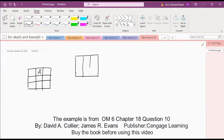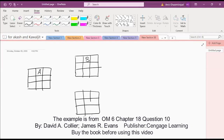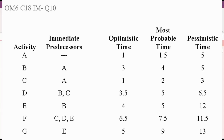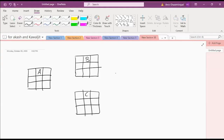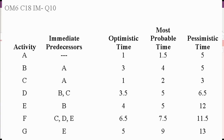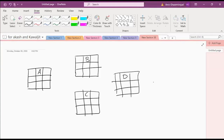Activity A is a predecessor for B and C. B and C are predecessors for D. B is also a predecessor for E.